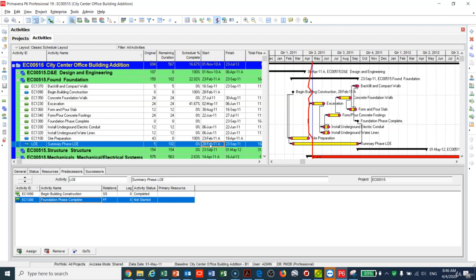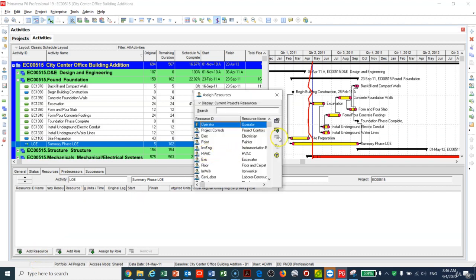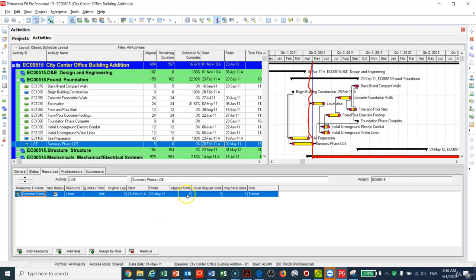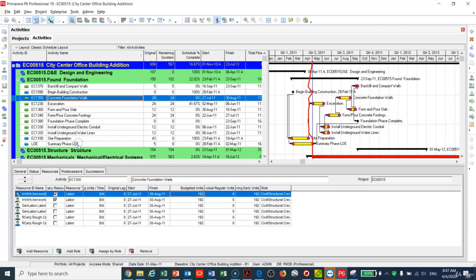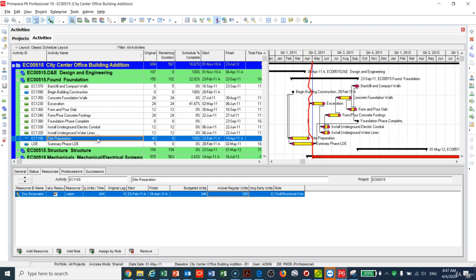You can also assign a resource — for example, an operator — to the Level of Effort and add the budgeted units. This lets you load the cost for the entire foundation phase on this one LOE activity, instead of adding cost to each individual activity. Each month, update the actual cost on the Level of Effort. I hope you found this lecture helpful — see you in the next one, thank you!